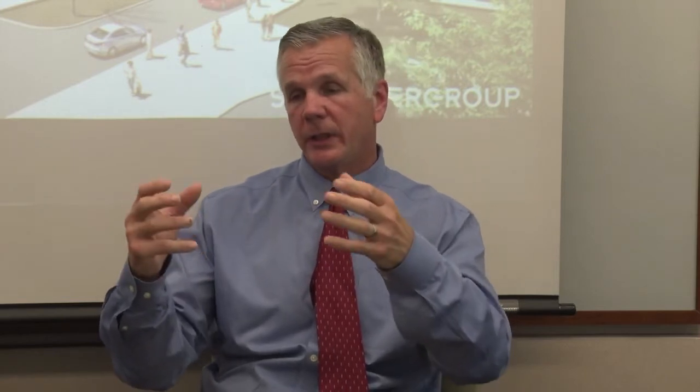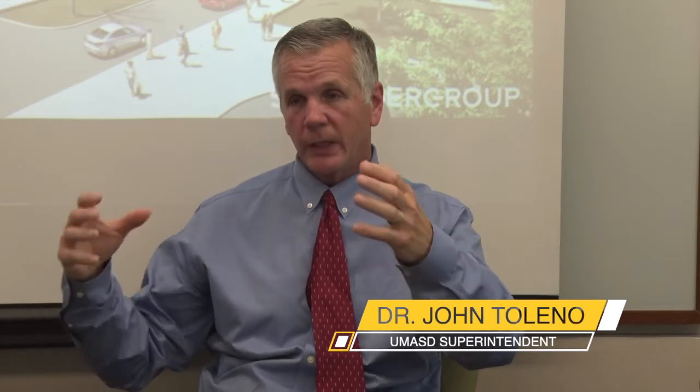So what we're doing, as you'll see later, we're building this facility between the old high school and the middle school. So we had to move everything else off our property for a period of time, except for our turf field, our stadium field, where we got a lot of use out of it now. And that's why that was put in place first. About 3 years ago, we installed that. We had no choice but to put that field in. Otherwise, we couldn't have done what we're doing right now from a phasing perspective.